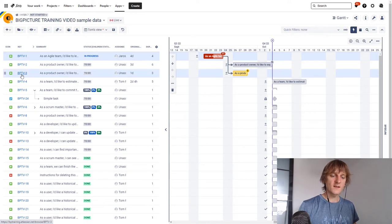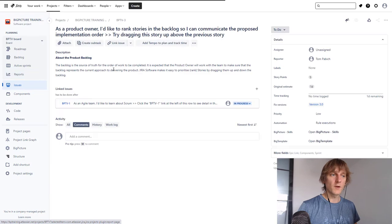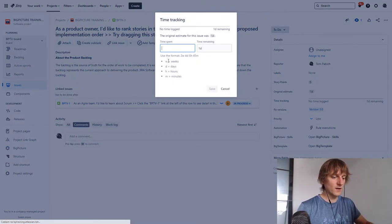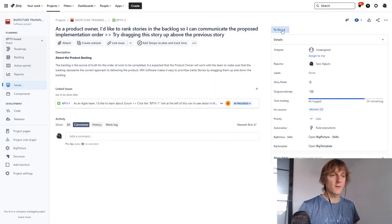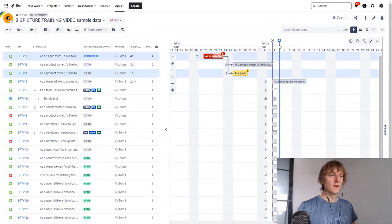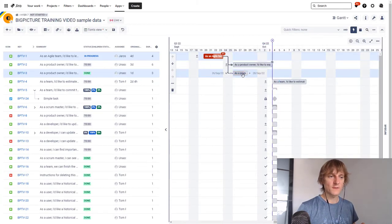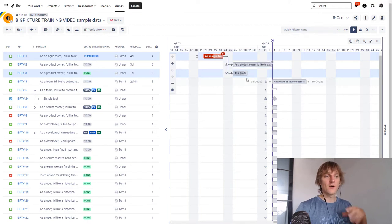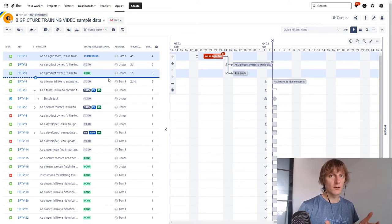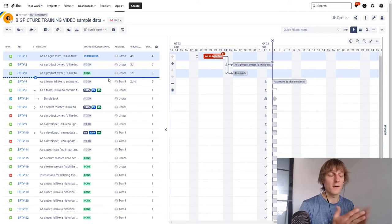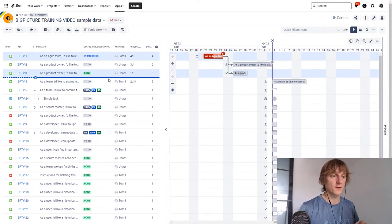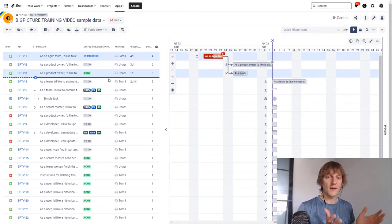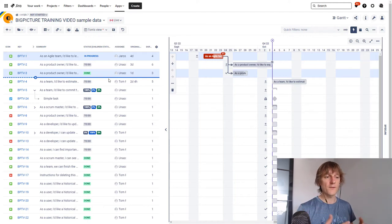If I add another day of logged work and save, then back in Big Picture — without refreshing — the progress moves to 50% because two days out of four have been completed. The task is still late because it should have been done 11 days ago, but there is progress. Looking at task number three: some time has already been spent — let's say six hours — and it's done. The progress bar is almost full, and the task is no longer marked as late because it's complete. It took a little less than expected, but it's completed. You don't have to work with time estimates — you can work just with statuses and it functions fine too. Big Picture gives you choices.